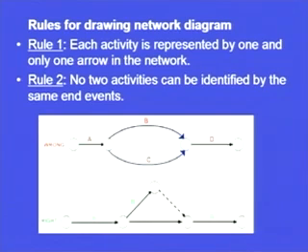So, the right network is shown, and a dummy activity has been incorporated to follow rule number 2, as well as a further modification: if activity E is only dependent on B, it can start from here and it will have nothing to do with C. But if we start it from the other point, then B and C would automatically become the immediate predecessors of activity E, which we do not want. So, I think most of you might have understood why dummy activities are used and what their use is in satisfying the logical precedence in networks.